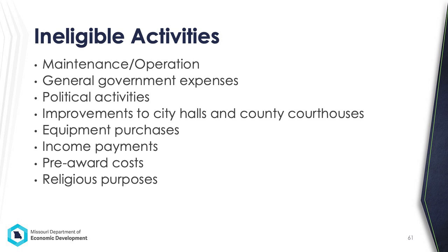There are some activities that we are unable to fund. These include maintenance and operation, which refers to any cost that recurs on a regular basis, which is generally less than every 5 years. General government expenses, political activities, improvements to city halls and county courthouses, equipment purchases, income payments, pre-award cost, and religious purposes.